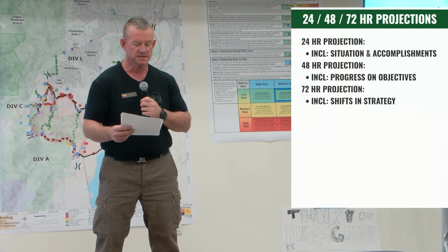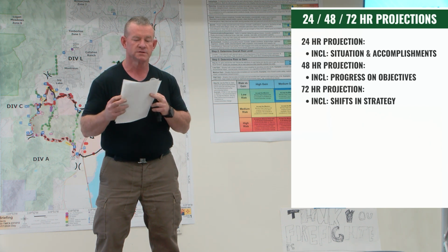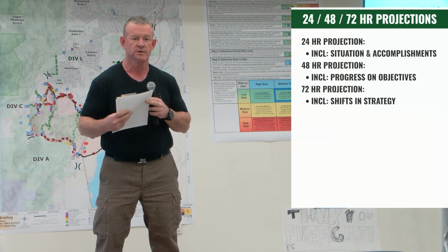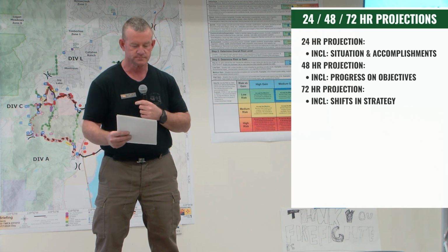And then at the end of 72 hours, you expect to be able to begin firing operations, which will take 2 operational periods to complete. So by reporting out on those 3 different items, now you've given planning ops indications on what the needs are going to be, not just for the next operational period, but for the next 2 after that.